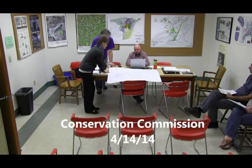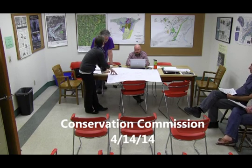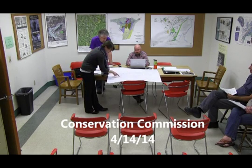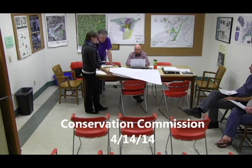I contacted Arch Street Development, who contacted their person, Michael Yu, I'm pronouncing that correctly, at Berkshire Design Group, and said please provide an updated plan. Although it's all caved in on that upper section, even though this is outside of jurisdiction, it erodes and runs off into jurisdiction. Of greatest concern was that there's a culvert that is a direct discharge across to the channelized stream here. They did have silt socks and other check dams in place to prevent the migration of eroded material. And I asked for updated plans so that we had something on record.